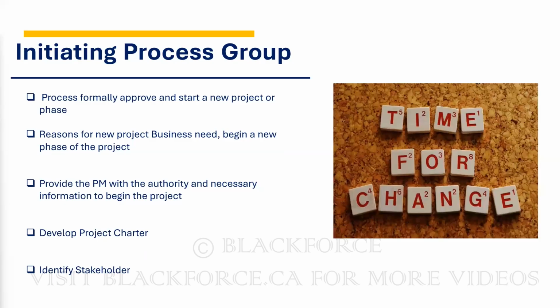The IT steering committee will then approve that business case. Then when that business case is done, they will say, okay, we can now start implementing the project. They will say, oh, project manager, see, this is the document. See the project charter. We have a project charter that has been developed, and we hand it over to you. It says, project manager, you now have the authority to start spending money. You have the authority to start using resources within the organization. So that's what the project charter is saying.